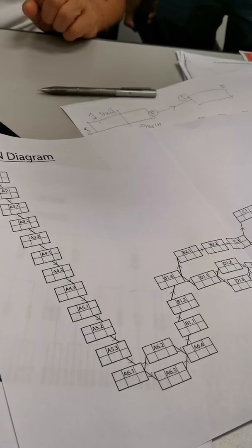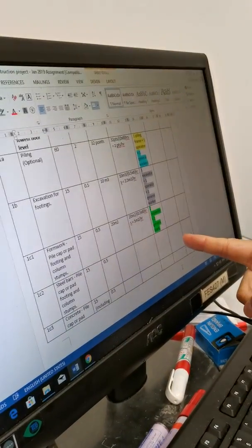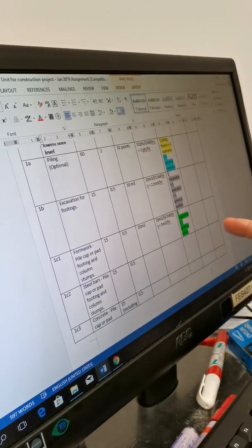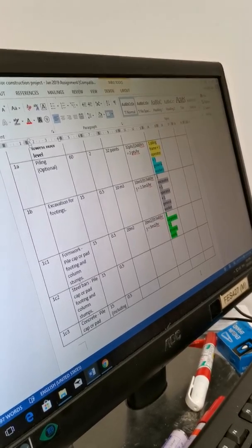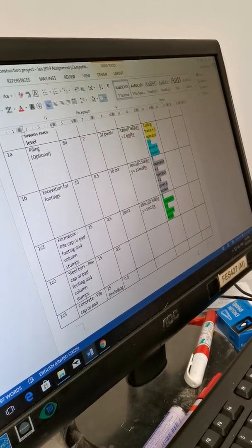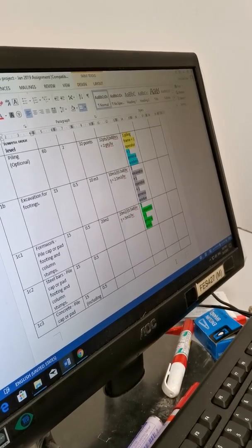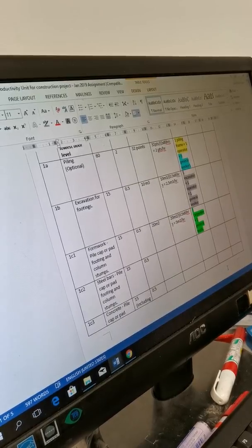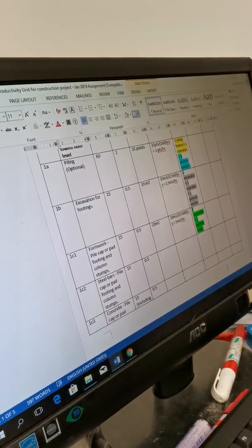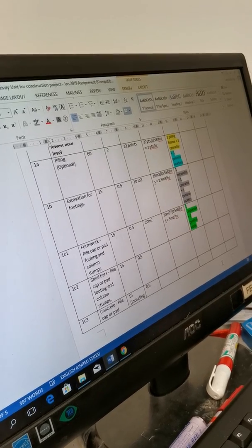And if the work is carried out by NSC, do I still need to allocate the resources, the labor and equipment? Good question. Generally, the details will be more towards, if it's a plumbing one, the plumber plus the general worker, but the numbers you may have to check with them. Because ultimately, even subcontractors, you need to know the potential labor content, because you're going to size up your canteen, your toilet facilities, all these things.